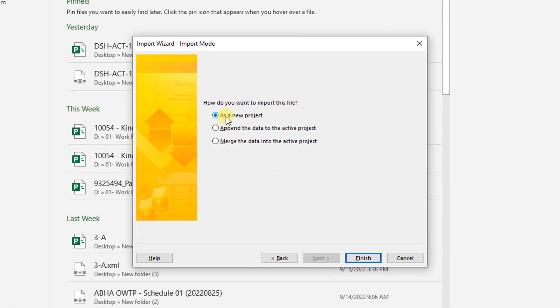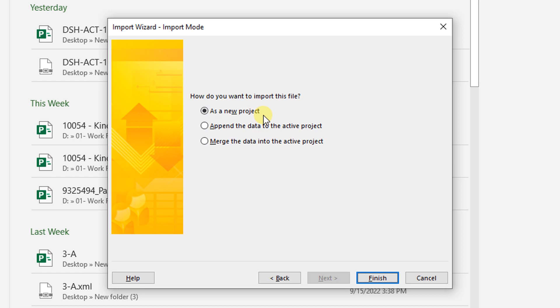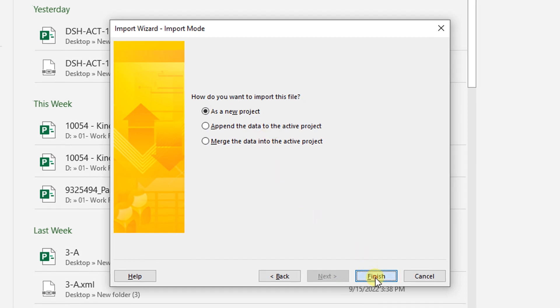Now you can import it as a new project, appending to the data, or merge it. I want to import it as a new project.